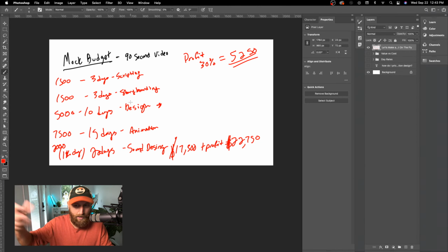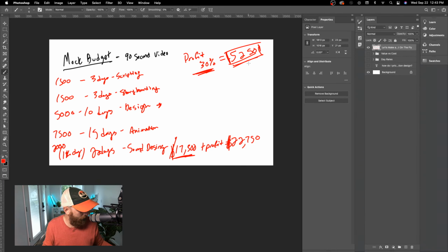So those other costs can get into that line item, and you really want to make sure you include everything, right? Because you're going to do your calculation on profit margin based on your cost summary. So the more you add into this cost summary, when you go to multiply by 0.3 and figure out, all right, what's my take-home pay? What can I put in the bank? What can I invest for the future? We need to make sure that everything is logically represented in there.